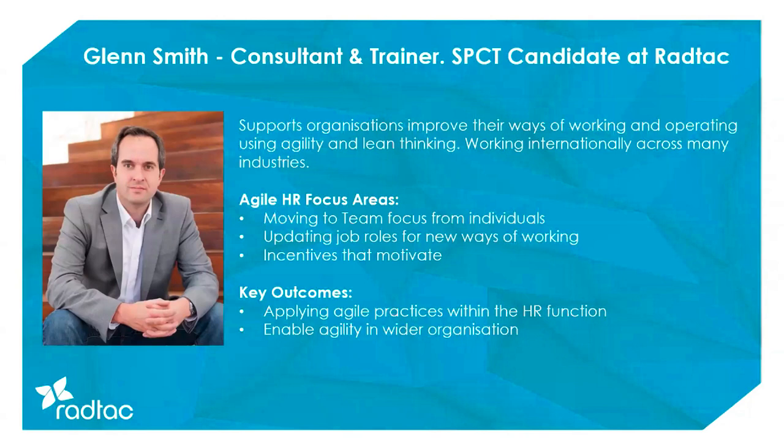If I just expand on the sorts of things that we were doing from an operations point of view, we were in essence using a hybrid model of Kanban and Scrum: a Kanban board, daily stand-ups, bi-weekly planning and retrospectives. But because we were looking to ease the introduction during what was a big change for the HR teams, and with a lot of other things going on in the organisation as well, we didn't institute formal Scrum Master or Product Owner roles.